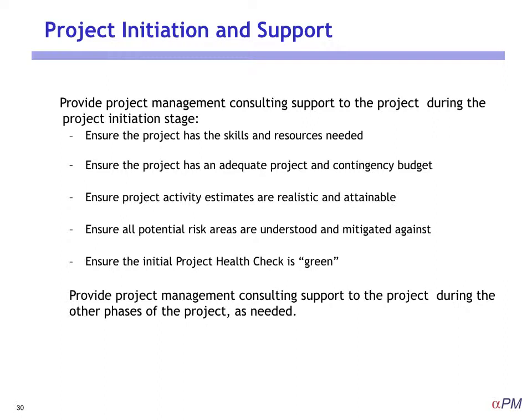Okay, the next area is project initiation and support. And again, this is where once you've implemented your PMO, projects are going to need help, and wouldn't it be great if the PMO could provide it? So the 5 to 7 resources that I said you needed in development, I'm saying change the mix now. So in the implementation phase, make 3 or 4 of those resources available to help all other projects. And this help, by the way, should be on a billable basis, so that time, if it's needed, is billed to the other projects.